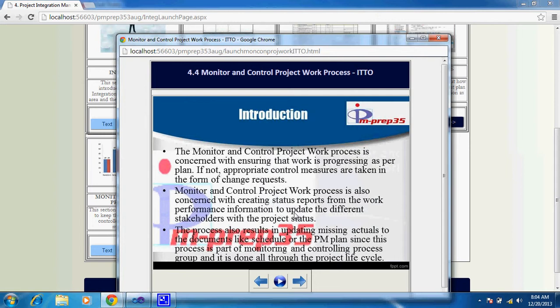But work performance information is more in line with the holistic view from a project point of view or a deliverable point of view: what percent has been done, what has been completed. The work performance report can be thought of as holders that have different work performance information or metrics fitted in, which is more formal or readable.